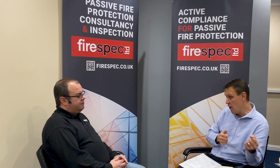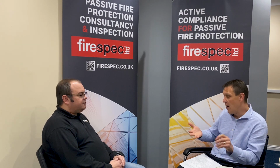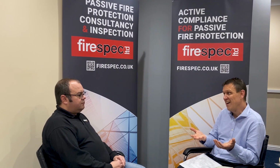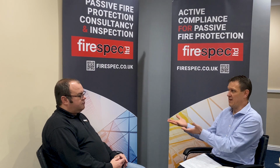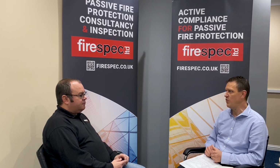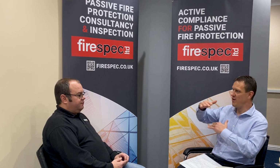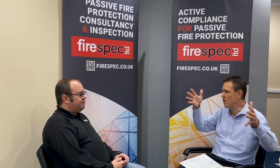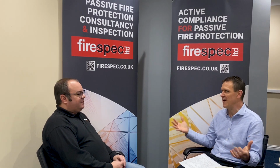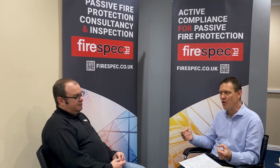We're finding that where we're not engaged early enough, where the manufacturer and the consultants aren't, or even sometimes the fire stopping contractor has not been consulted early, they just get given a set of holes with services penetrating through and told to go and fire stop them. With a lot of these buildings, we walk in and go, there's literally nothing you can now do with that. You haven't left enough space between your builder's works and your door heads. You haven't left enough space between your builder's works and your builder's works. Everything's cramped. You've got fire dampers going through the same openings as multiple services, and it's like, guys, you're going to have to rip all your services out, reroute things and rebuild your walls before you can get actual compliance to tested details.